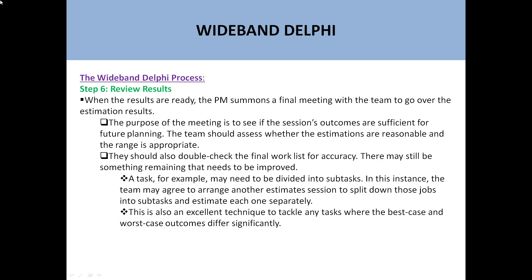Then comes the review of tasks. When the results are ready, the PM summons a final meeting with the team to go over the estimation results. Once results are compiled, the project manager calls another meeting to see if the session's outcomes are sufficient for future planning. The team assesses whether estimations are reasonable, double-checks the final work list for accuracy, and tasks may need to be divided into sub-tasks. This is also an excellent technique to tackle any task where the best case and worst case outcomes differ significantly.